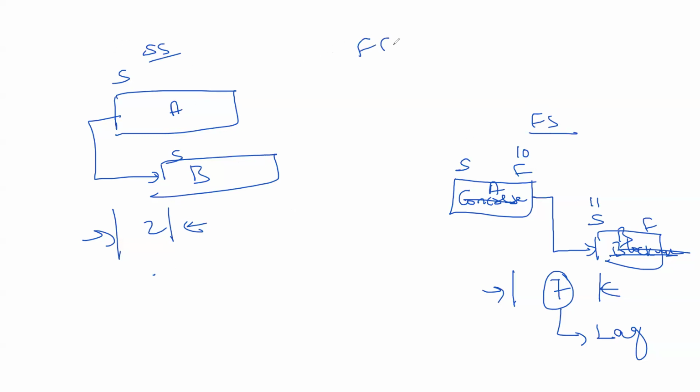Similarly, finish to finish. If I'm saying activity B can finish, let's say 1 day after the finish of A, what will be the relationship between A and B? Finish to finish, but there's a lag of 1 day. So lag will delay the successor activity.